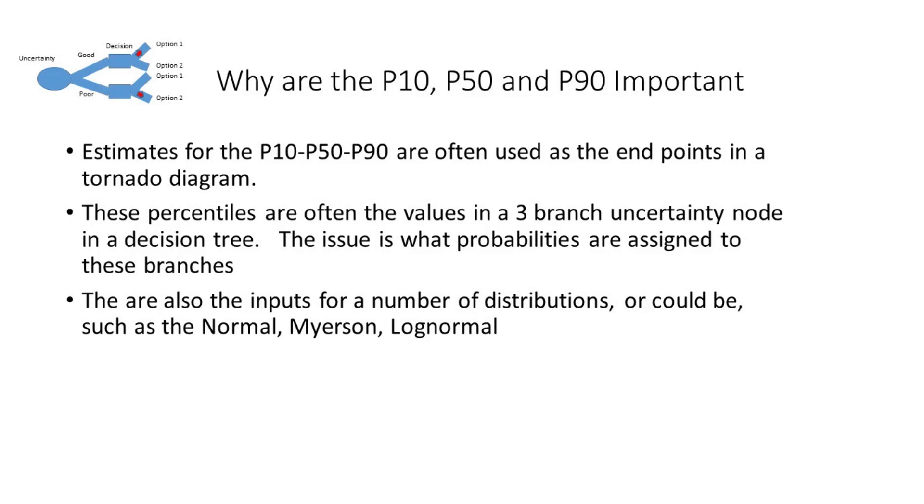The Normal and Lognormal could also be defined as the mean and the standard deviation. However, sometimes it's difficult to know what those numbers are when you're talking to a subject matter expert. And talking about the P10, P50, P90 might be an easier conversation.